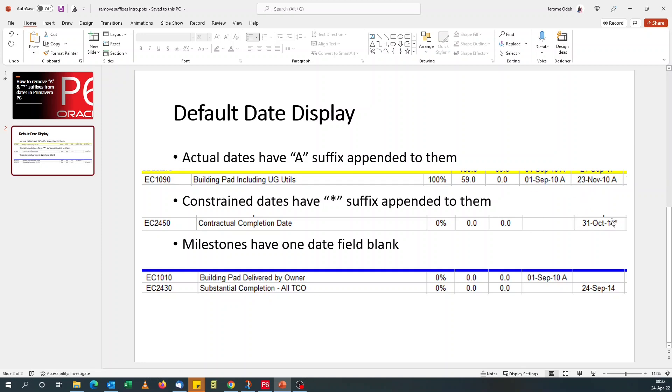And for constrained dates, it shows you that the dates are not held in place by logic. You're using a date to drive it. Most times it's with milestones that you use constraints.